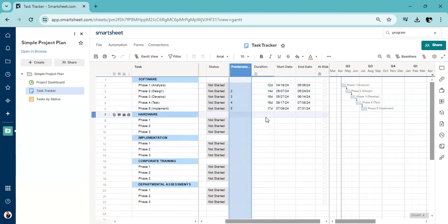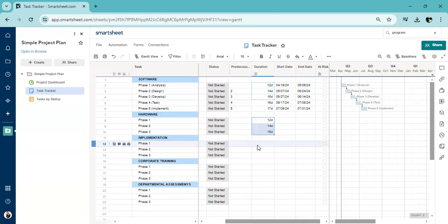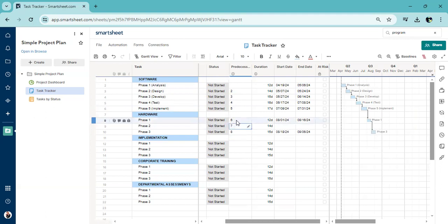So same for this. We could just take these as a dummy, put them here. And this is how you would track like 5 projects, one spreadsheet, minimum amount of information. Remember how we do this? We're going to make this a predecessor. So this should be 6, and then 7, and then 8. Did we get it? 6. Oh, this will be 8 and 9. Like that, if they are really joined in that way.